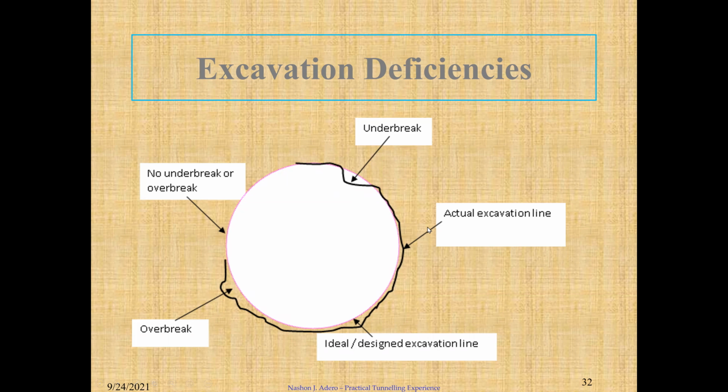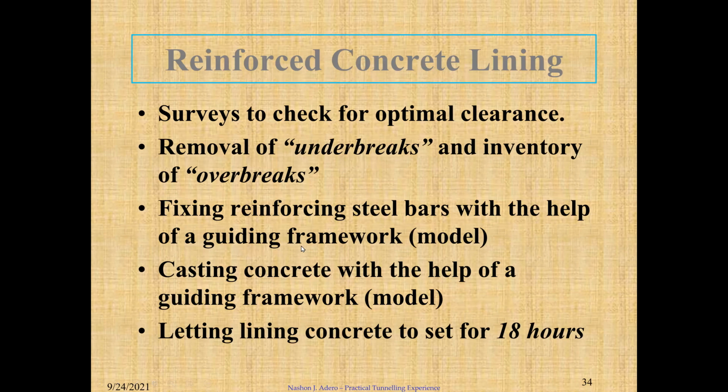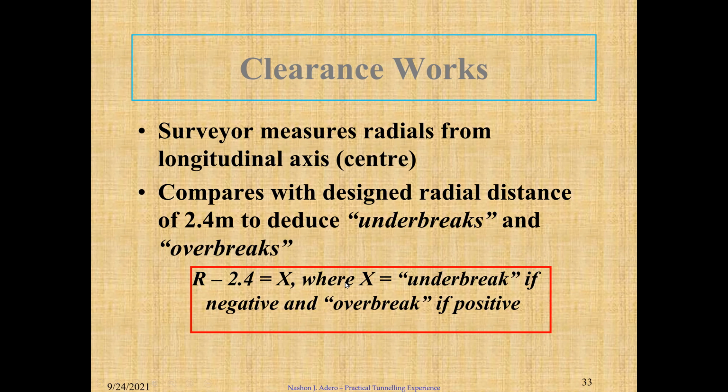And those ones form the basis for construction costs. And the contractor uses those to make any additional claims, because these underbreaks and overbreaks come with their own costs. Clearance works. Yeah, this is just an example of how you can measure the overbreaks and underbreaks.